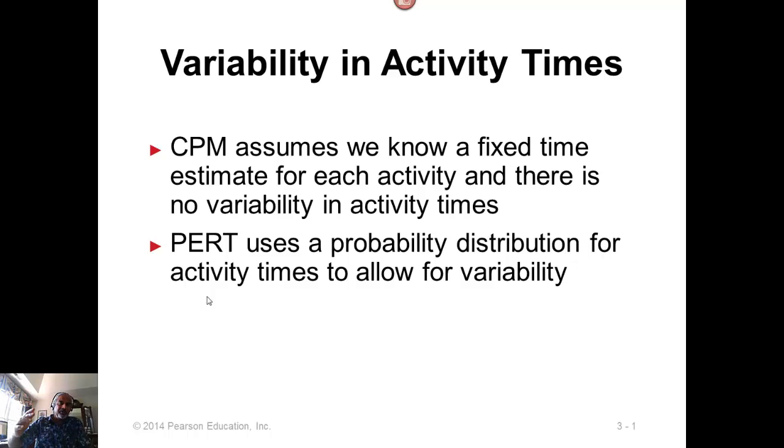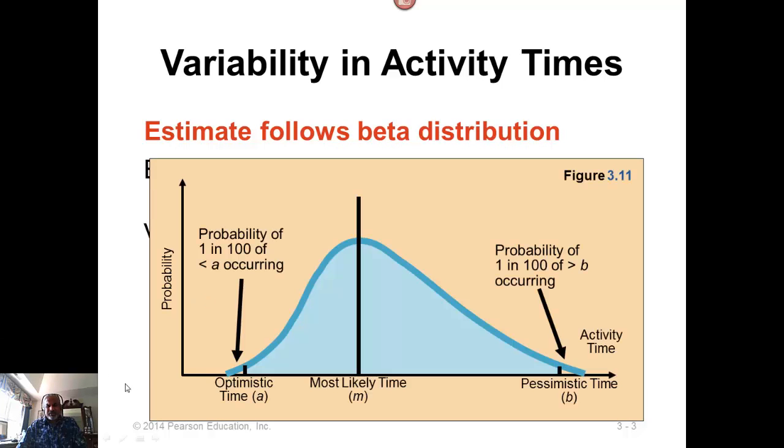But on the other side, if the activity gets delayed, it can go from 5 to 6 weeks or 8 weeks or 10 weeks or 15 weeks or 20 weeks. There is no real hard ceiling for how far off, how much delay there could be in the activity time. So the probability is not symmetric. It's more like a normal distribution with the upper side tail kind of shifted to the right, something like this. This is called a beta distribution, so it is reasonable to assume that if the activity times are variable, then it's going to follow something like a beta distribution.